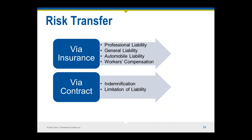You can also try to limit your liability — a provision within the contract specifying the maximum amount of liability that can be incurred. That's helpful when the risk is out of proportion to the reward, when insurance is unavailable or too expensive, or the project is really unique. It may make sense to say to your client, 'I want to work on this, but the risk is very high — I want to limit my liability.' It could be to a dollar amount, to the amount of insurance you have available at the time the claim is settled, or any other negotiated amount. Just remember that indemnifications and limitations of liability are both very jurisdiction-specific, so you need legal assistance to make sure they will stand up in the governing jurisdiction.